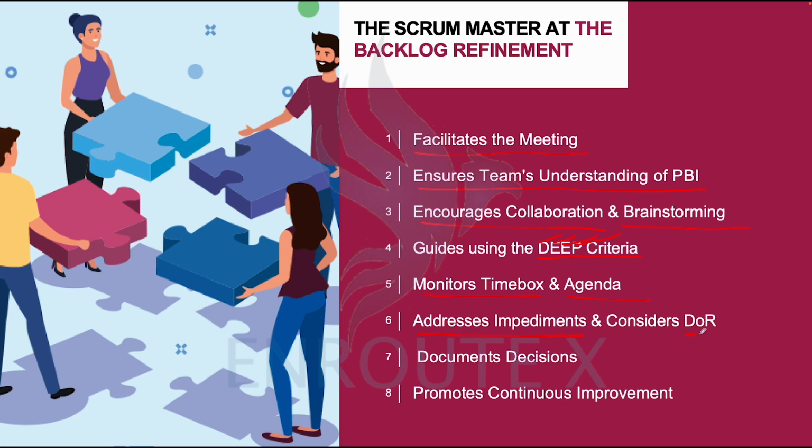That's why we added DOR. DOR stands for definition of ready. I believe by now you clearly understand what definition of ready is. Definition of ready points to a story that is ready to sprint, which means all the resources needed to deliver that particular task are available. Resources including availability, capacity, whether the story meets the INVEST criteria, and all the rest is available for that piece of story. So the Scrum Master is ensuring a balance of all this.